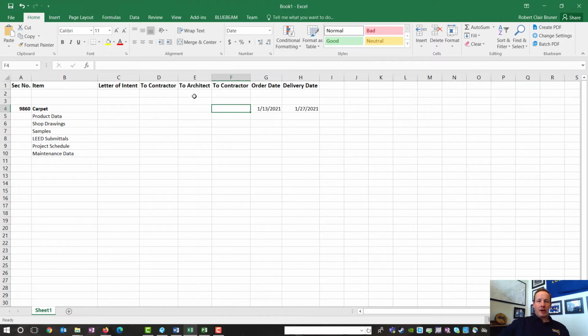Now, to the contractor, the difference between the order date and to the contractor is how long it takes to get the submittal approval from the contractor back to the subcontractor. So let's say we can do that pretty quick. Let's give ourselves 2 days.